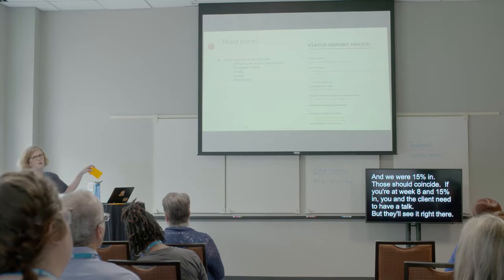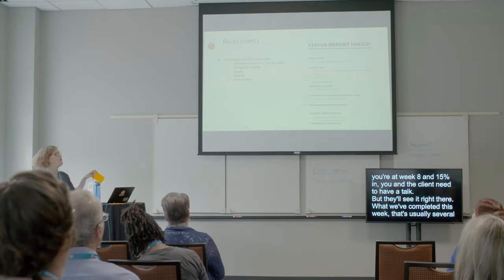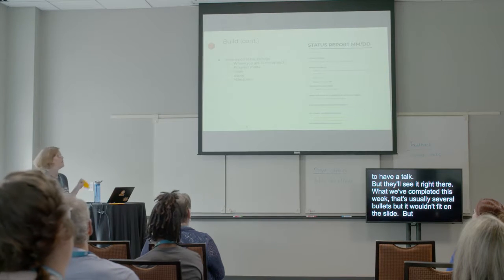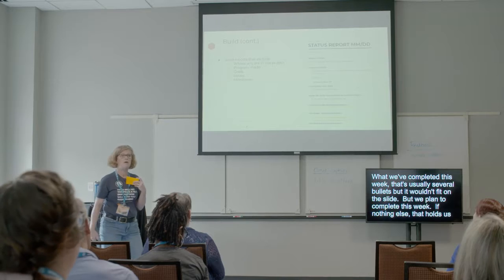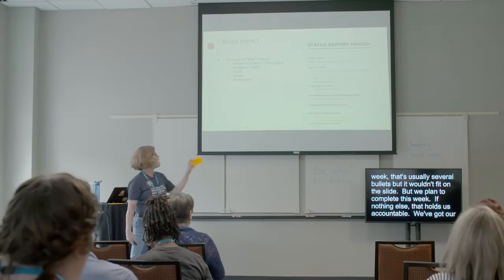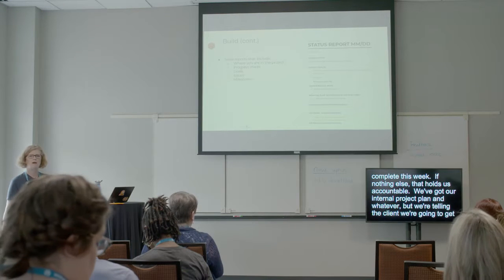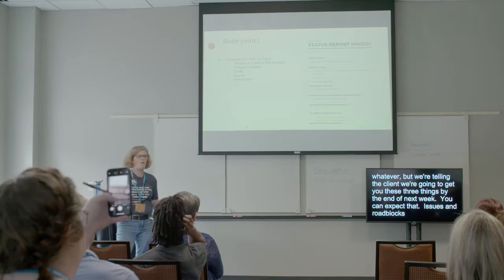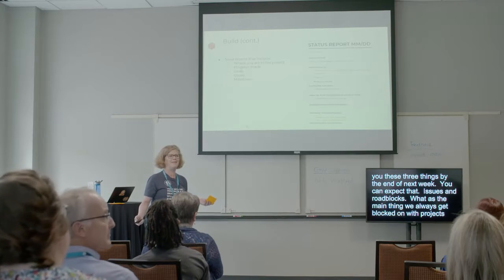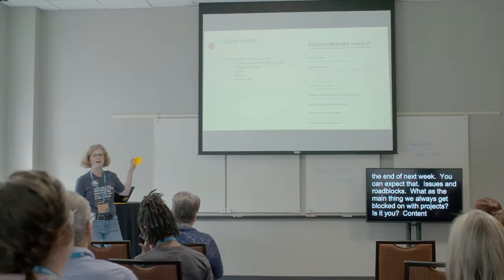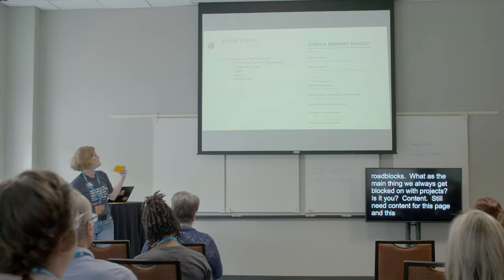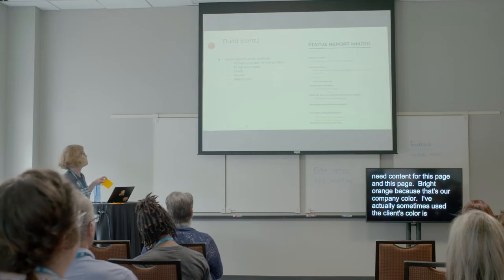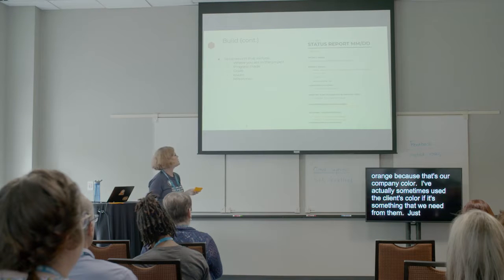What we've completed this week. That's usually several bullets. What we plan to complete this week. If nothing else, that holds us accountable. We've got our internal project plan and whatever. But we're telling the client, we're gonna get you these three things by the end of next week. You can expect that. Issues and roadblocks. What's the main thing that we always get blocked on with projects? What holds your project up? Is it you? Content. Still need content for this page and this page. Bright orange. Cause that's our company color. I've actually sometimes used a client's color. If it's something that they're due. That we need from them. Just another couple upcoming tasks and milestones. And then, I'm trying to avoid talking about tools. But I've linked to our project management tool. So they can be reminded of the full milestones and where we stand. And giving them links to it. Toward the end, I also give them links to the staging site on the bottom of that.